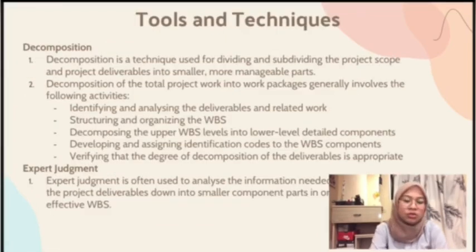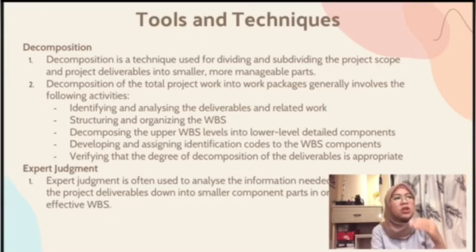Okay, next is tools and techniques of Create WBS. As I said before, there are two things, which is decomposition and expert judgment. Decomposition is a technique used for dividing and subdividing the project scope and project deliverables into smaller and more manageable parts. The work package is the work defined at the lowest level of the WBS for which cost and duration can be estimated and managed.